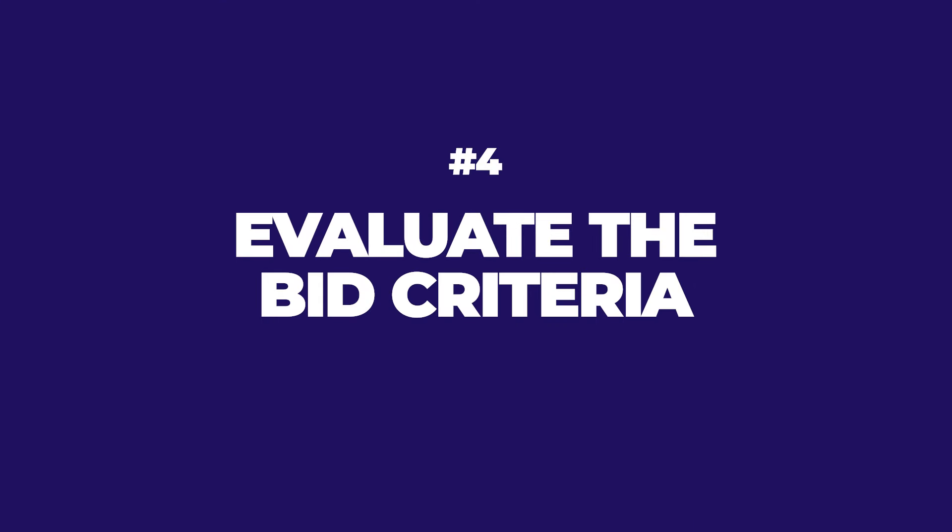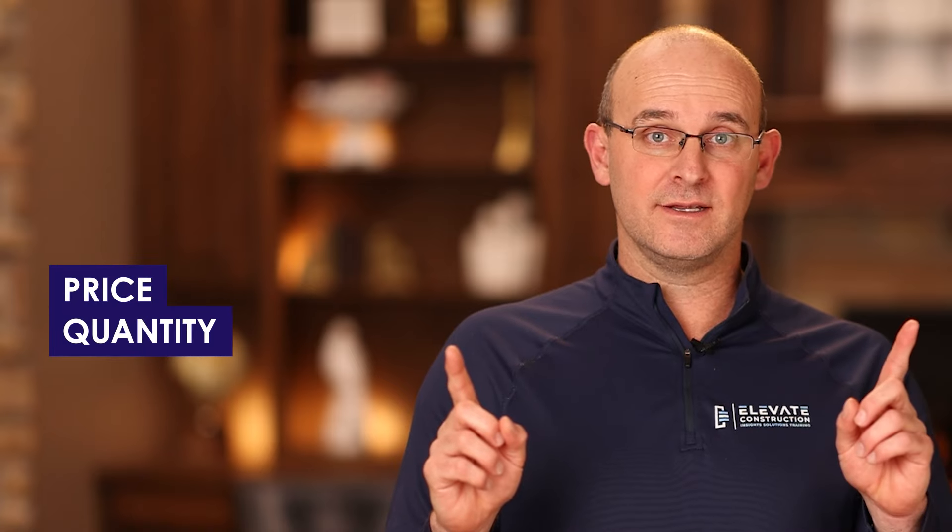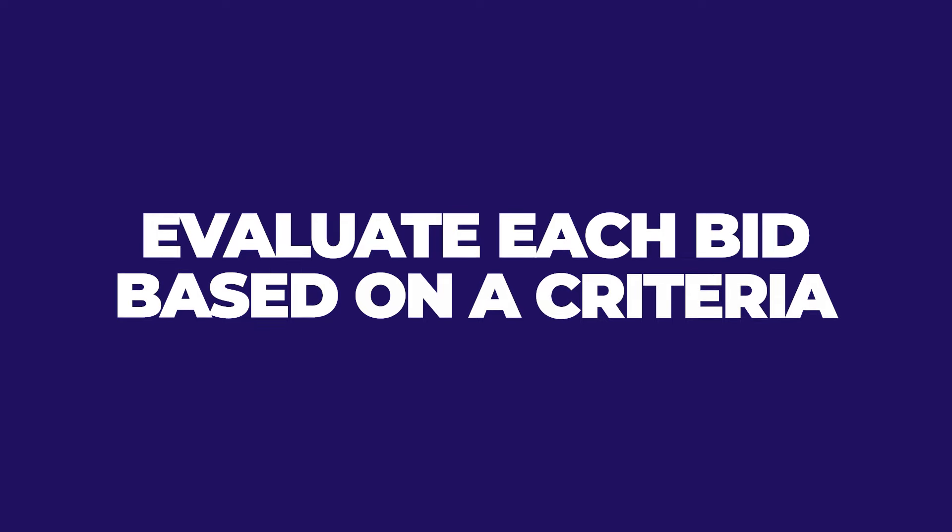Number four: evaluate the bid criteria. You're going to evaluate each bid based on price, quantity, experience, schedule, and technical capabilities. For really critical scopes where you don't already have a relationship, I recommend doing an interview. For critical trades like mechanical, electrical, elevator, and exterior, actually interview them, get a feel for their team, and let them explain the details of their bid. It's key that the evaluation criteria is set ahead of time — and you might even communicate that to the trade partner — so it's based on real data, not confirmation bias.